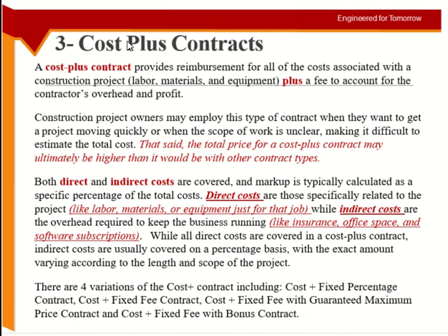Okay, so even in the previous type, at least you know the type of work. But here there is more ambiguity. There is more flexibility. So even if the type of work is not known, you hire a contractor which can take care of the bridge as well as the road. And in the end you say, okay, whatever work comes, I will give you, or we will settle on this much amount of profit for you. And whatever else is there, I will just pay you on cost basis. You will spend 50,000 BD total, you get 50,000 BD, but your profit will be separately this much. Clear? So the profit is not included in the cost which the contractor is quoting.